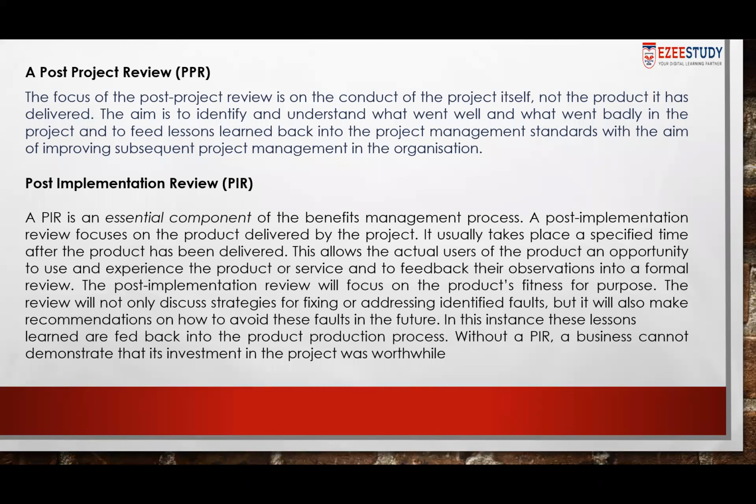So these are the two types of review that will be carried out after the end of the project. The first one's objective is to learn from the experiences gained during the process, and the second one is to check how effective the project was in delivering the expected results.